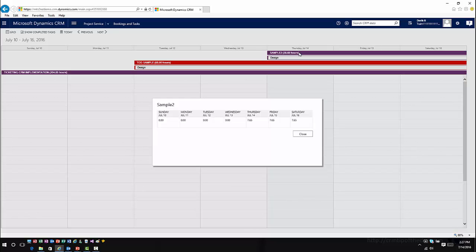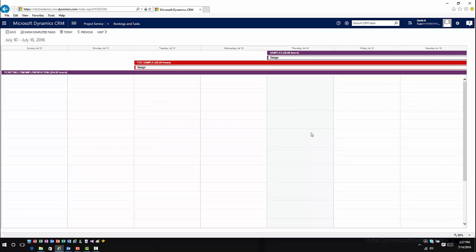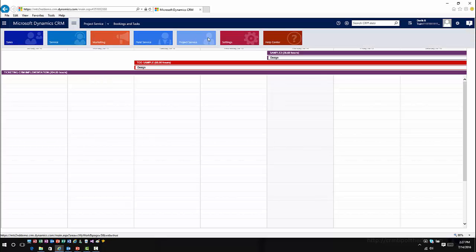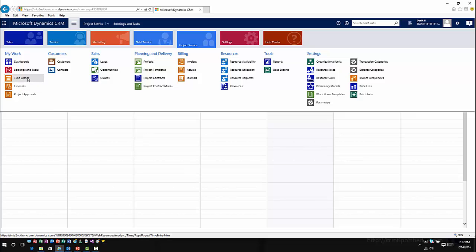Part of this is going to depend upon how scheduled I've been for those individual situations. A lot of these hour situations come based upon your work schedule. You have to make sure for every resource added here that you go into their work hours and define — like 8 to 5 or whatever. If you leave them set at 24/7, you're going to overbook people. So you want to make sure that everybody is defined within those items.